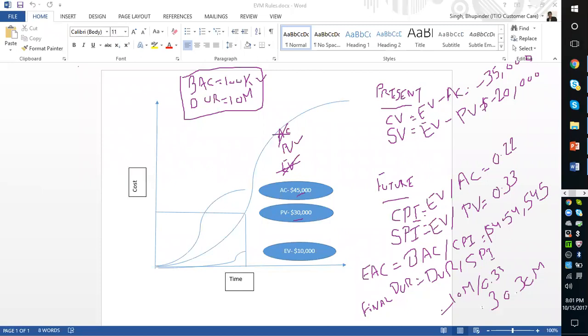And for CPI or SPI, less than 1 indicates we are going to be behind schedule and will be overspent, right? So this is how you choose. For example, in the examination, if it is given your SPI is 0.5, what does that mean? You are behind schedule, right? So this is how you take the right judgment.